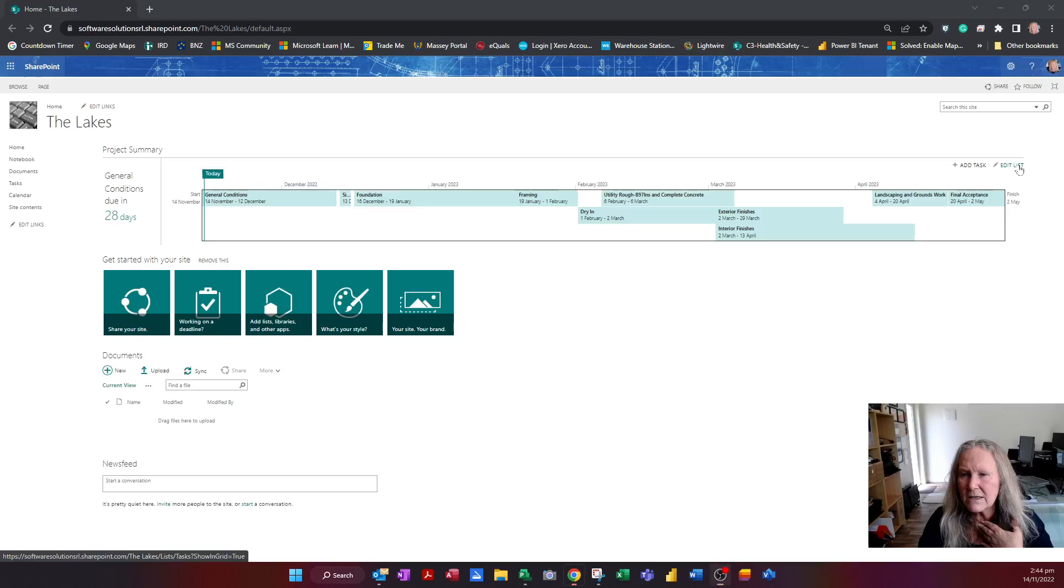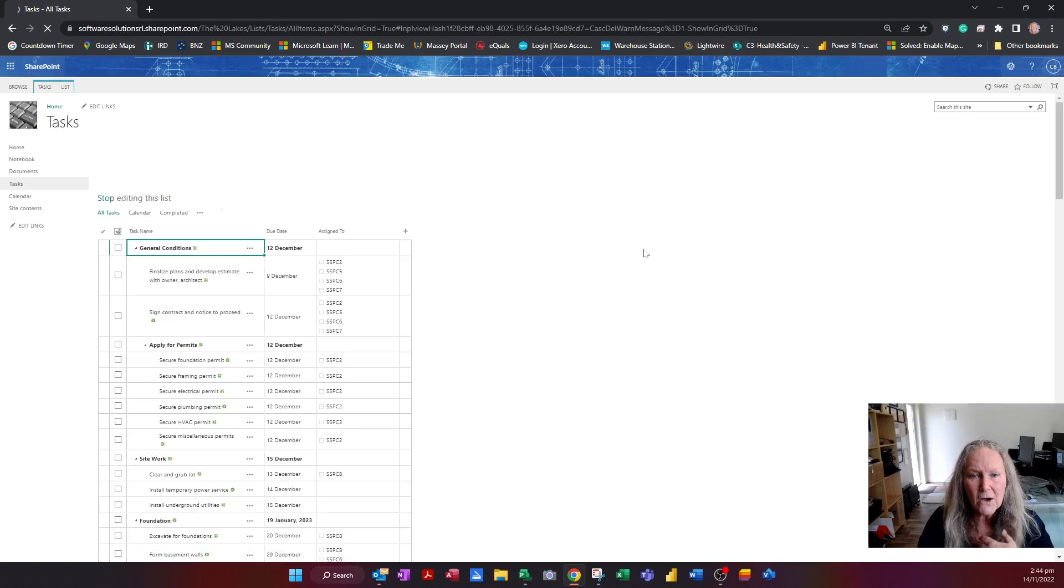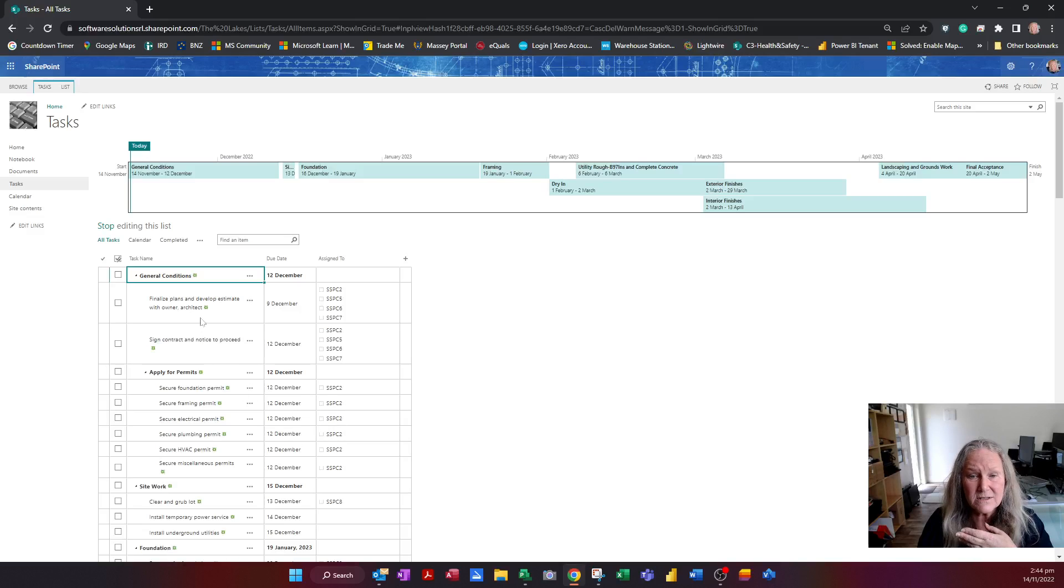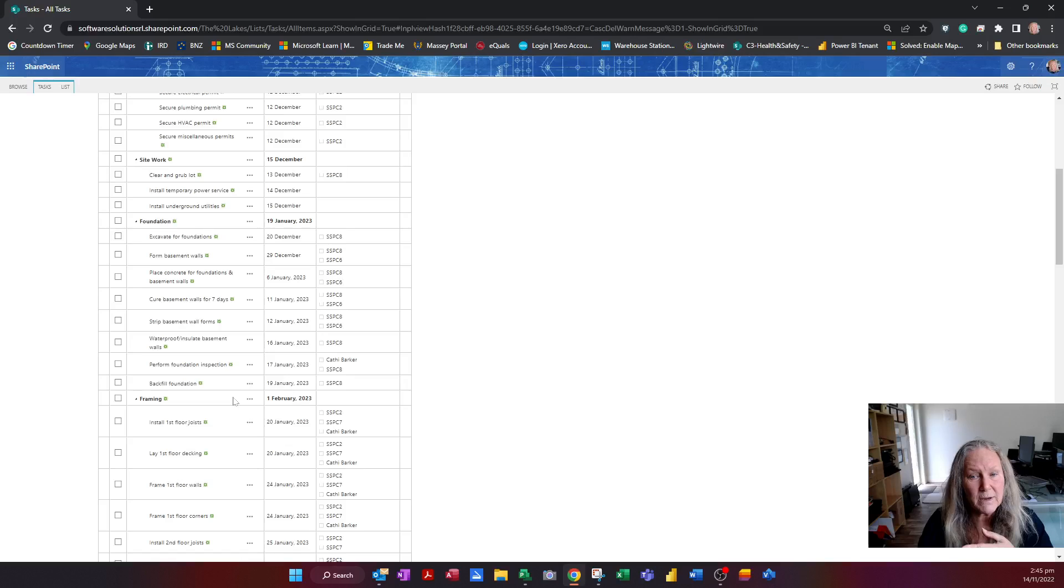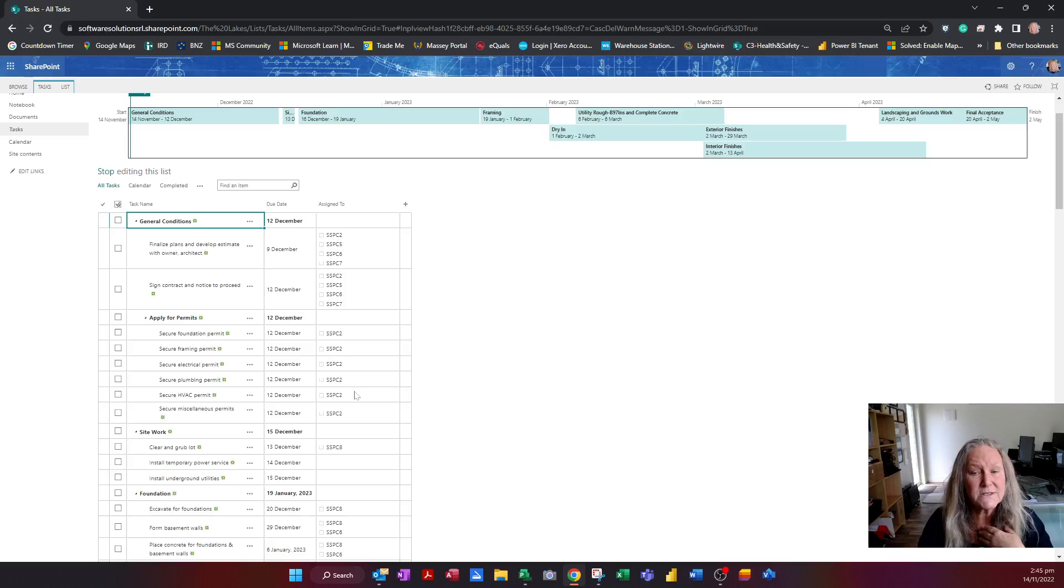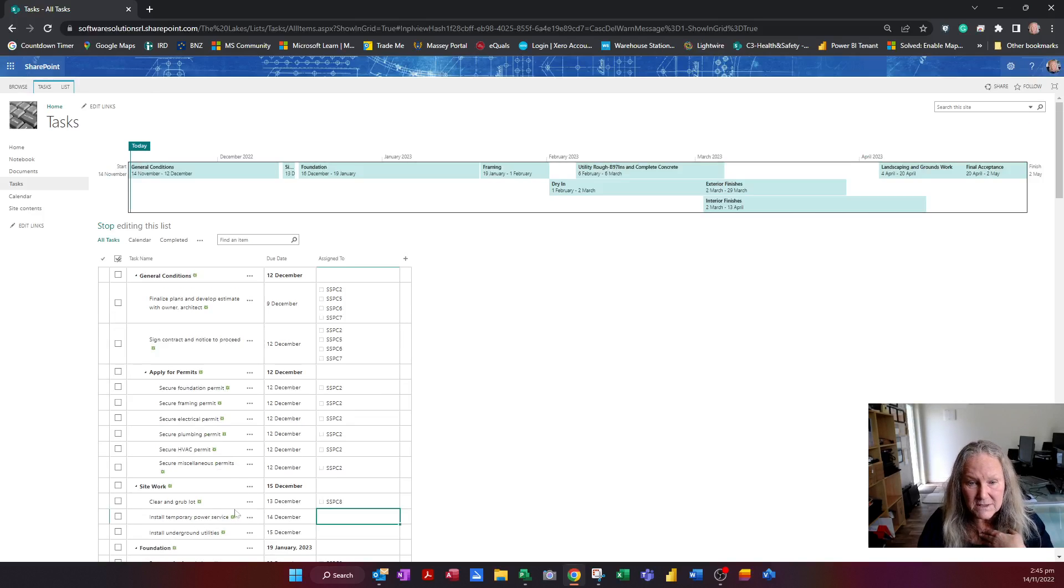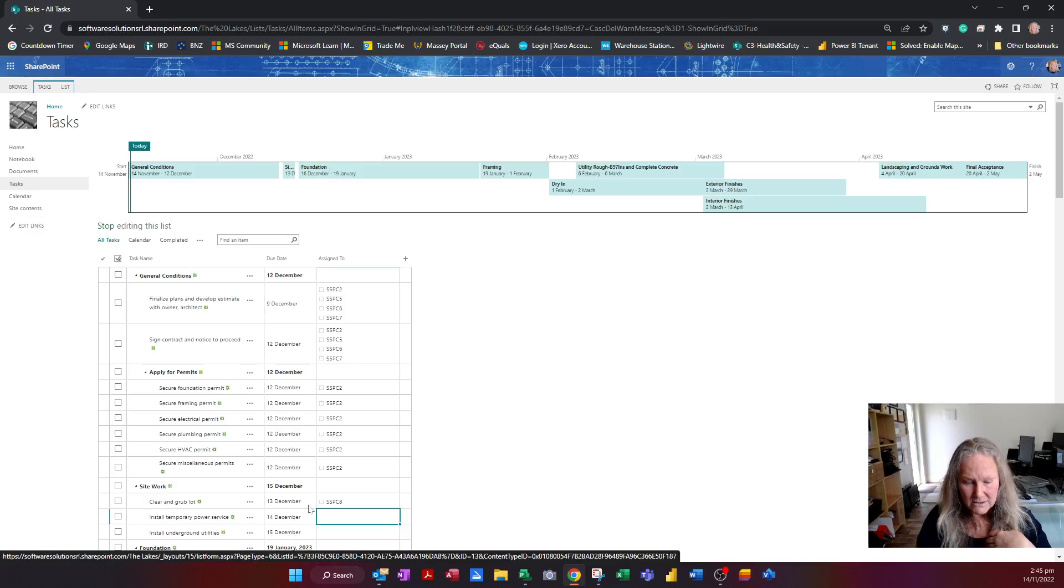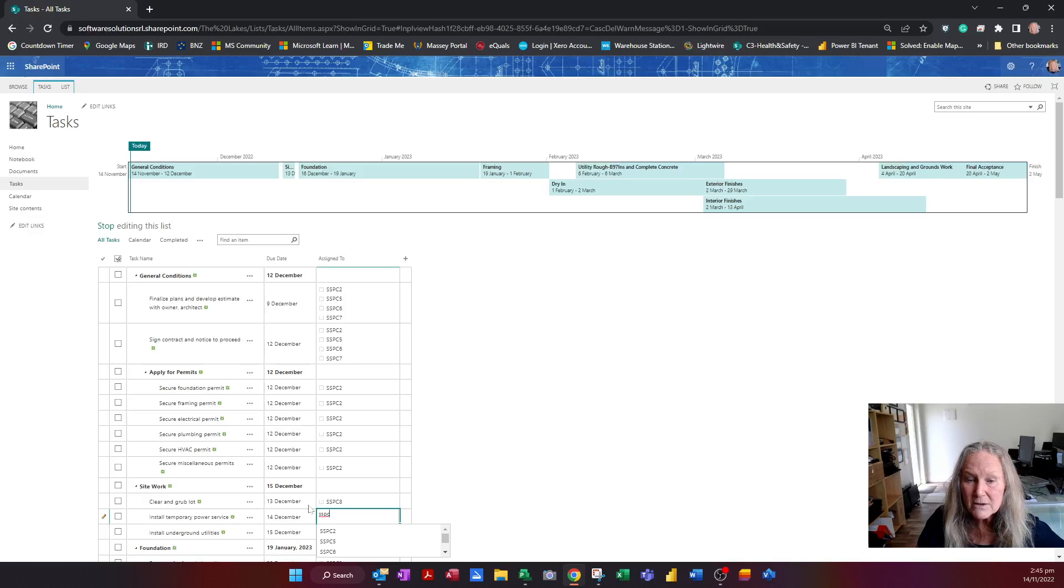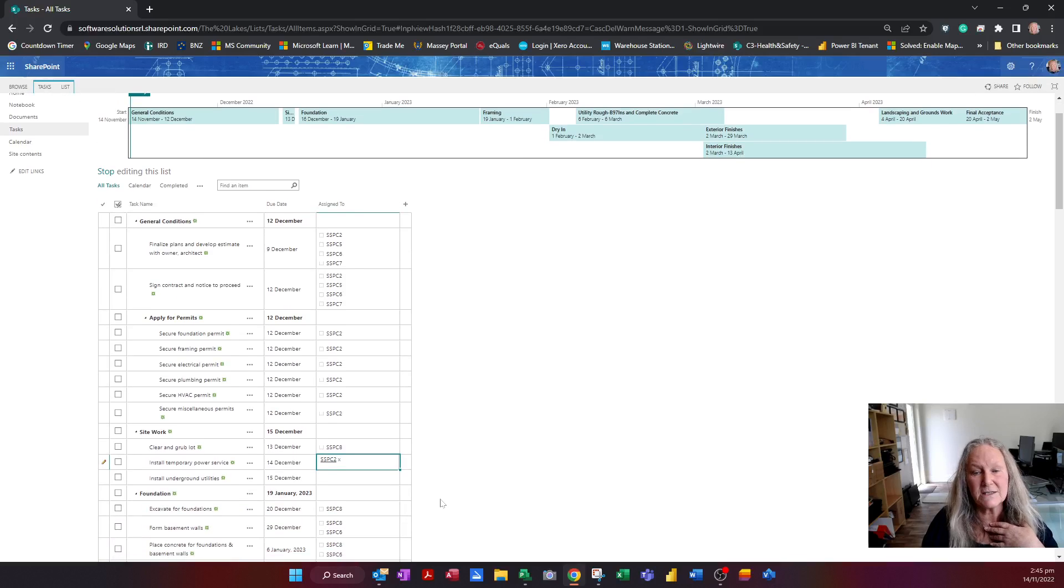If I go into edit list, I'm using SharePoint now to see all the tasks that are in my project plan, when they're actually due and who's been assigned to these tasks. I can even see that nobody has been assigned to installing a temporary power service. So I might put Software Solutions PC2 in charge of that particular task.